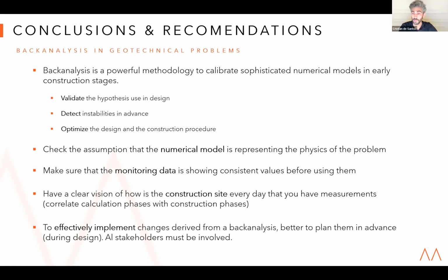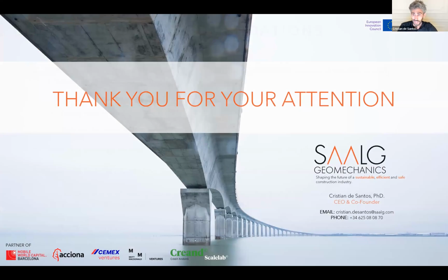So it's better to plan in advance a conservative design or different design options. You agree on all the different options depending on different geotechnical situations, and then once you have data, you decide, let's go for option B, C, or whatever. But that's really important. And that was more or less what I was intending to present today.